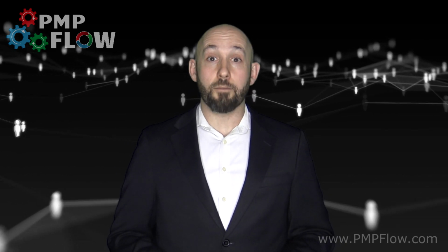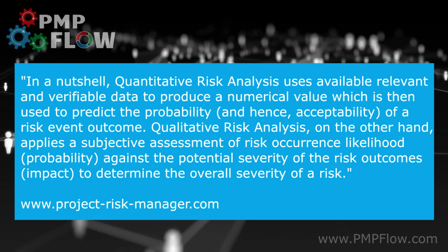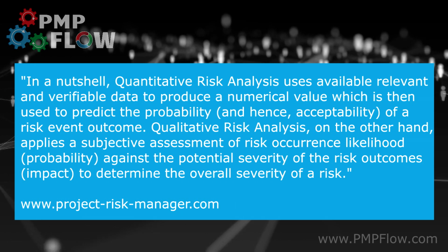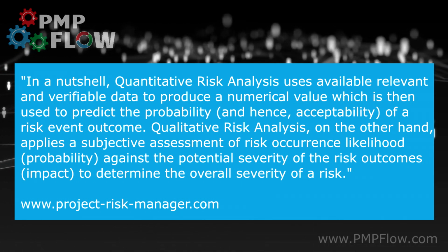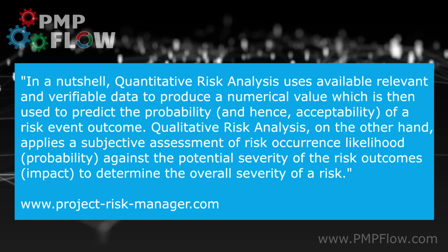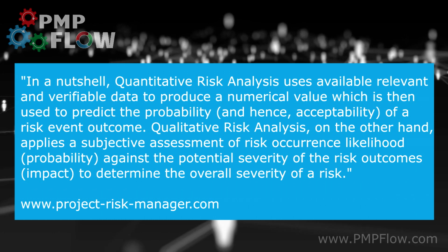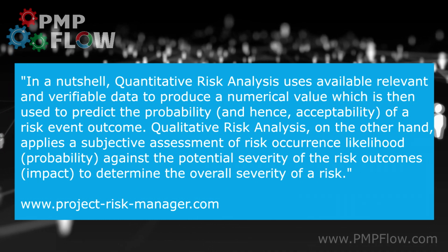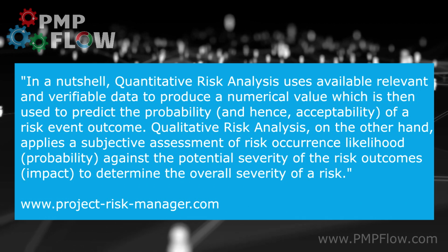There's a great section of an article on projectriskmanagement.com I'd like to share with you that defines this quite well. In a nutshell, quantitative risk analysis uses available, relevant, and verifiable data to produce a numerical value, which is then used to predict the probability of a risk event outcome. Qualitative risk analysis, on the other hand, applies a subjective measurement of risk occurrence likelihood against the potential severity of the outcome to determine the overall severity of a risk.